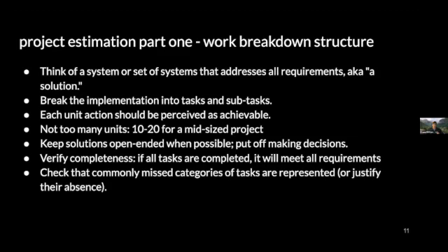There should be about 10 to 20 for projects, research projects of the scale I'm talking about, small single PI research and analysis grants. And again, push off technical solutions as much as possible. Now, that might not be entirely possible at this stage. You might have to make certain technical decisions in order to break something down into specific tasks, but as many technical solutions as you can push off until later, do that, because it will provide you with more flexibility later to deal with issues, especially once your project is underway.